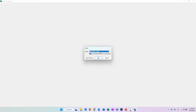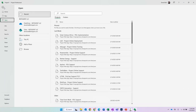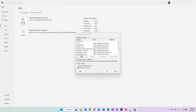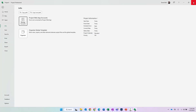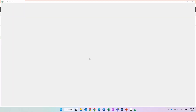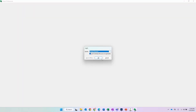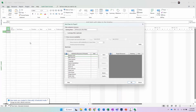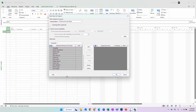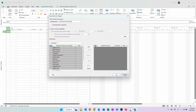We'll select and click on Project. I'm going to click on Computer and click Blank because I'm creating a new connection. If you need to see this done in a slower mode, I do have a video that focuses on that — we'll set up that link in a subsequent video. We'll go back in Project and select Project Request again. It should log us directly in there — it just takes a moment, there's a little delay as it's connecting to the cloud environment. If I select Blank Project and press Control+T, which brings up Build Team from Enterprise — look at that, there are those resources we just added via the sync. They can be added to the system.